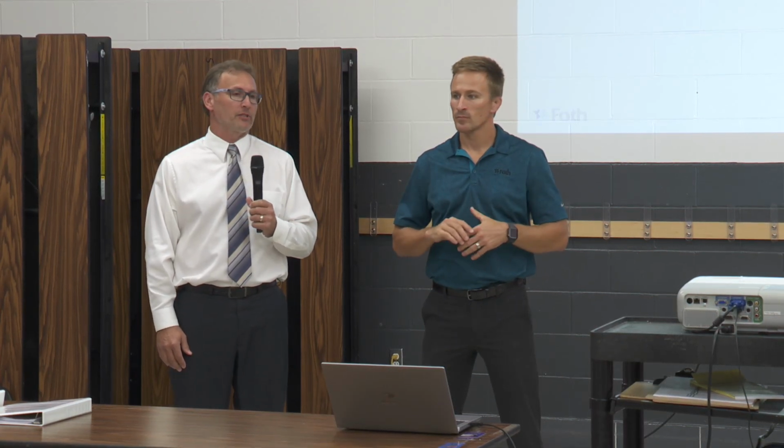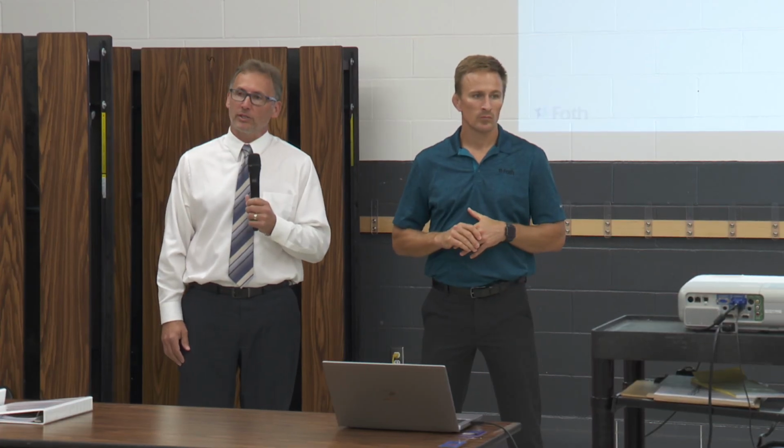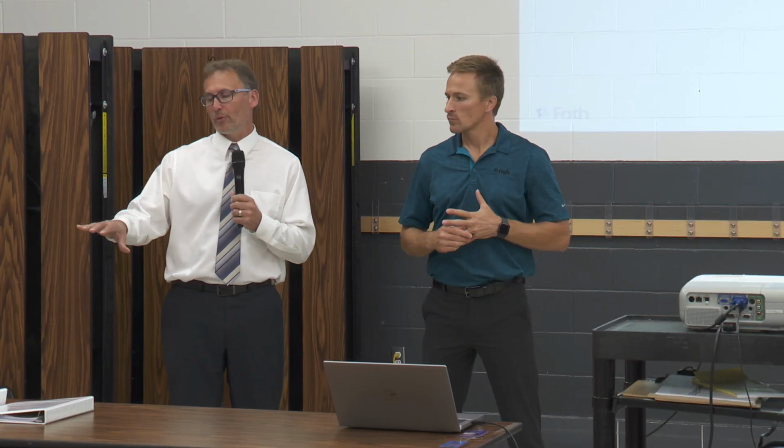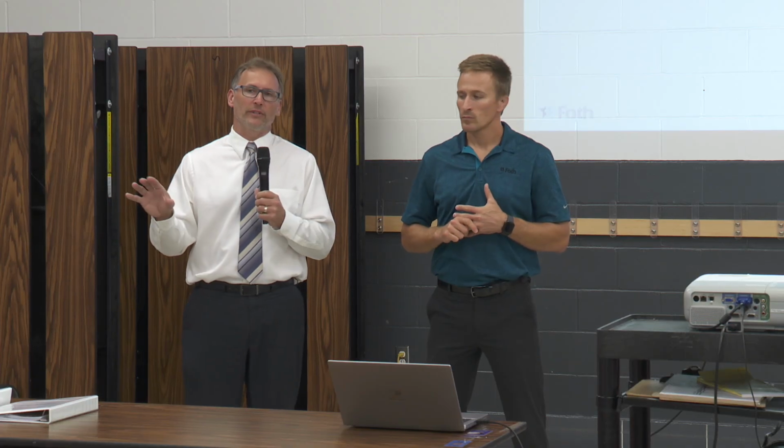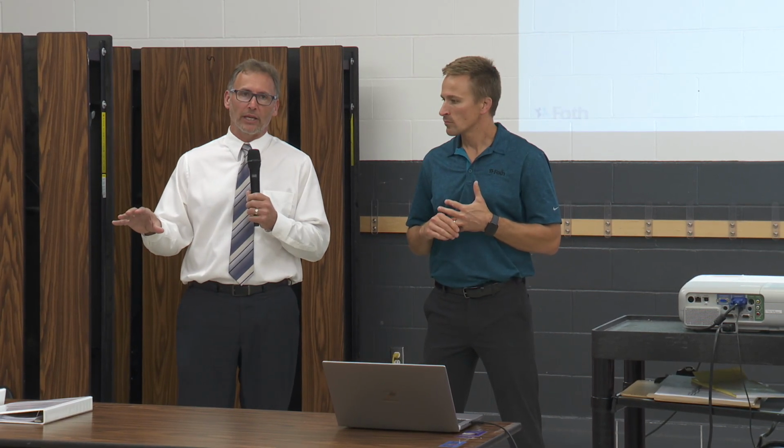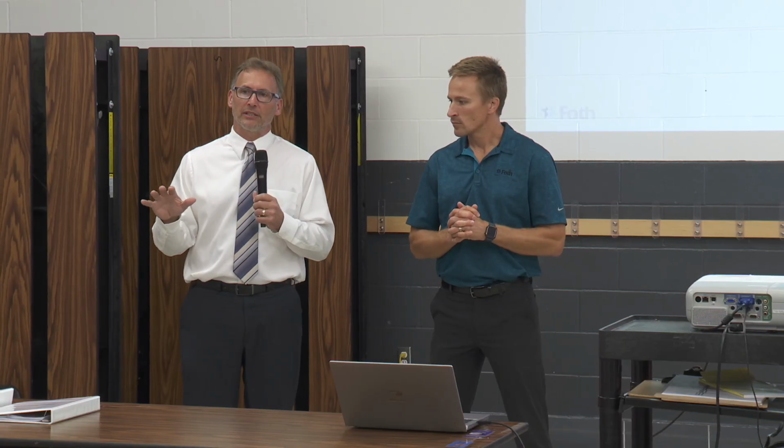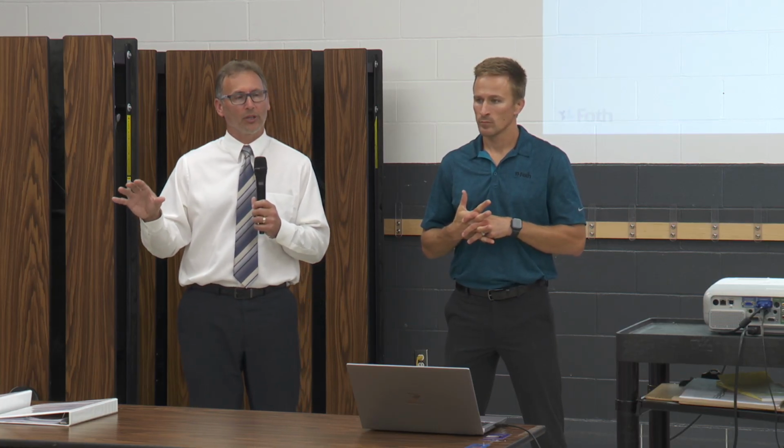So if people have some individual property questions, we'll be around with some of the parcel impact displays. And I guess one thing I just wanted to reiterate on the parcel impact displays, we're at about 60% design right now. And when you get to 60%, it's a pretty solid design. There aren't major changes, but things still could change. So these are not final parcel impact diagrams. These are generated from a 60% plan set. So there could be additional changes.